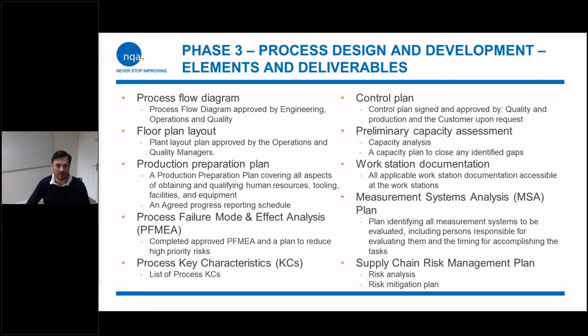Production preparation plans, qualifying people. Do you have the competence? Do people need to go on specific training courses? You get all kinds of things for electronics: IPC 610, 620, things like that. So maybe this is a new product that requires additional training and resources. Don't leave it to the last minute, because especially at the moment, things are getting quite difficult to get booked on courses, things like that.